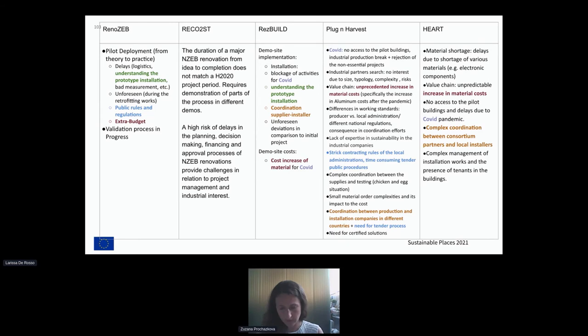And if there is any innovation, which is the purpose of a European project, and it's also true for any kind of innovation in the construction industry, that means you need to get that material already for the testing phase. The problem is that the manufacturers or suppliers are not willing to provide such small quantities of their products, and therefore we stand in front of a situation where we cannot get the materials before ordering the quantities for the whole project.